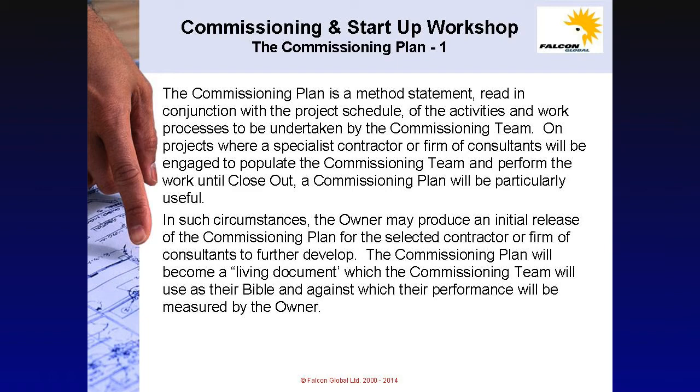In such circumstances, the owner may produce an initial release of the commissioning plan for the selected contractor or firm of consultants to further develop. The commissioning plan will become a living document which the commissioning team will use as their Bible and against which their performance will be measured by the owner.